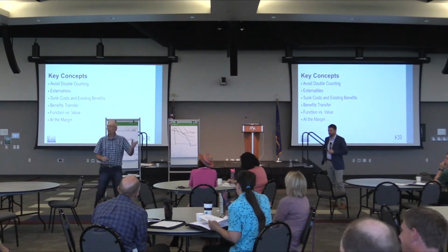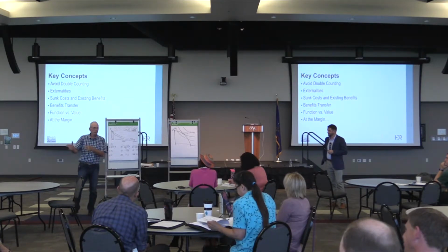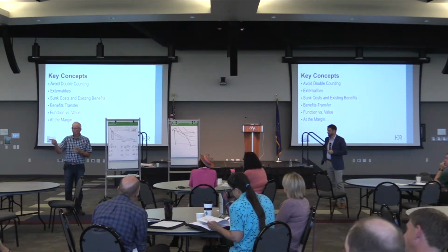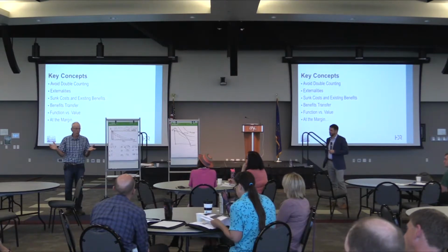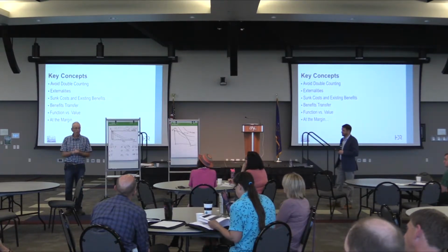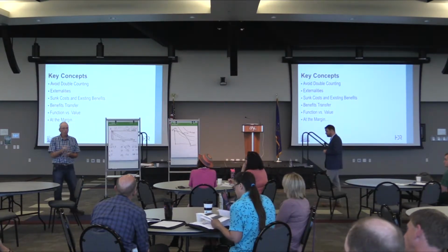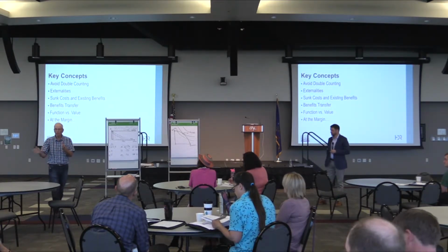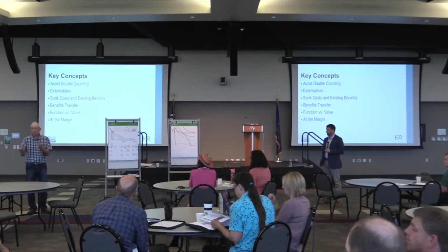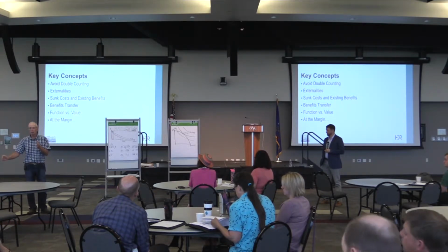Dunn County. Okay, so you got a wetland in Dunn County, and we know from the literature that wetlands recharge groundwater. Is that function worth anything in Dunn County? Well, probably not, because the groundwater has no value, essentially, in Dunn County. So function is not benefit. Function is a step of getting to the benefit. You need to say what it does to whom, quantify it, and put a dollar value on it.